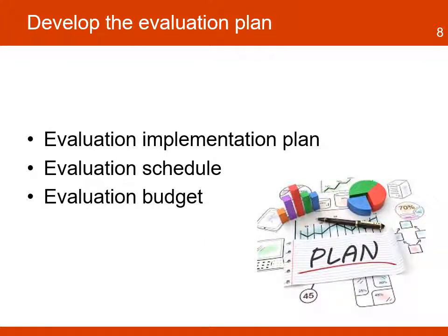The next step is the planning of the evaluation. The evaluation plan summarizes the key elements of the evaluation process and serves as a guide during the implementation of the evaluation. It identifies timelines, resources, and defines roles and responsibilities.